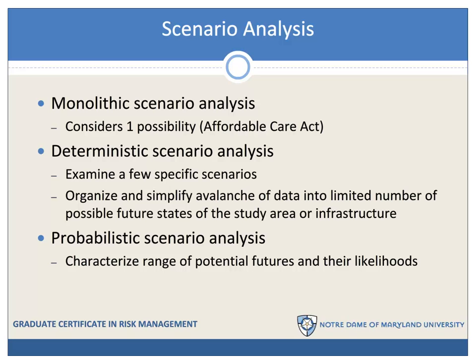Deterministic scenario analysis examines just a few specific scenarios, more than one, but less than the hundreds and the thousands that we've seen in our Monte Carlo simulations. We would use deterministic scenario analysis to organize and simplify this avalanche of data that we are faced with into a limited number of possible future states of the study area, the infrastructure, or the risk problem that we're interested in.